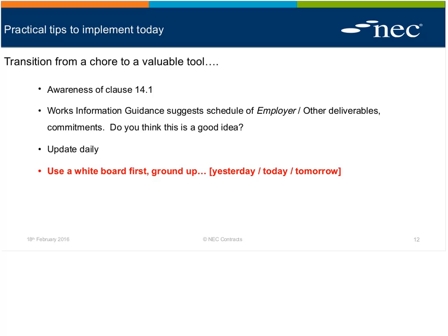And this is probably the top tip, so toppest tip of all of them: get yourself a whiteboard, stick it in the site hut or where the guys are putting their boots on in the morning, cut it into 3 columns, yesterday, today, tomorrow, or if that's a little bit too granular, last week, this week, next week. There's your resourcing, because you can say this is what I'm doing and what kit I'm using. I've seen people get their section engineers just to sign the bottom of it. No contractual connotations to that. It's just good record keeping.